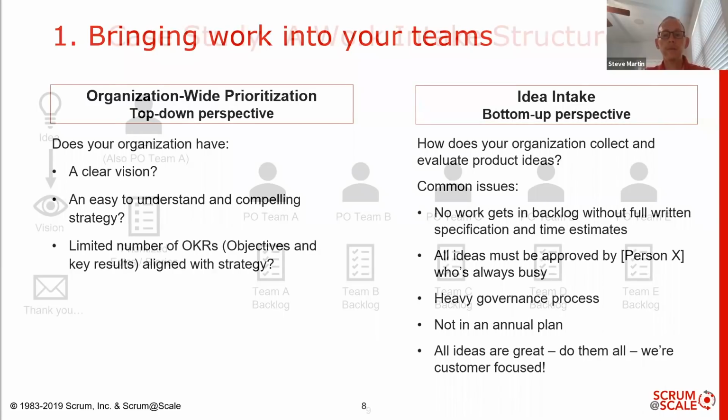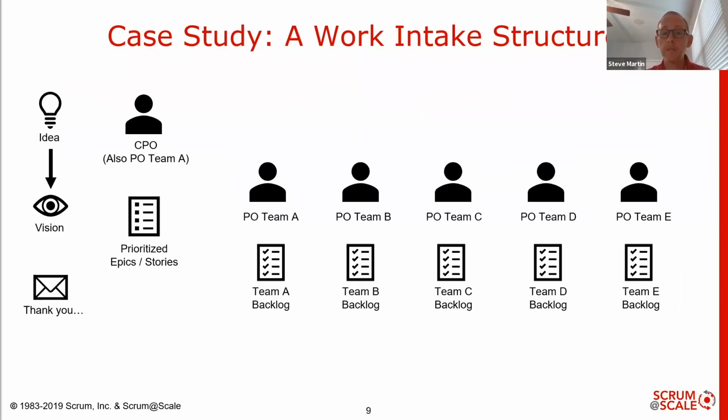Great. Yeah, thanks, Carrie. So let me present a model that we did at a financial services firm where it easily took between 3 and 4 weeks for an idea to even be considered to include in a release. Now, what happened in the past is that there was an idea that went to a BA who did some analysis, who wrote some specs with some others, got on a governance planning meeting if they had room. That was held once a month. And if actually everybody showed up, the idea might get approved for more requirements gathering and release planning.